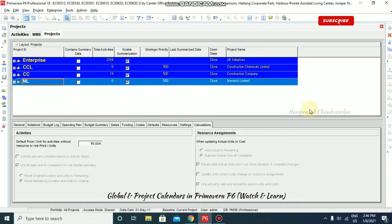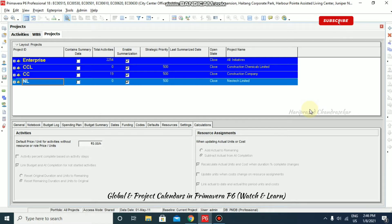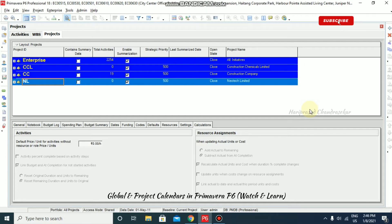Now we will see calendars in Primavera. You can create and assign calendars to each resource and each activity as well. These calendars define the available work hours in each calendar day. For example, Sunday you can put some other work hours, Monday to Thursday you can specify different work hours. You can also specify national holidays, your organization's holidays, or project-specific work or non-work days, including vacation dates.